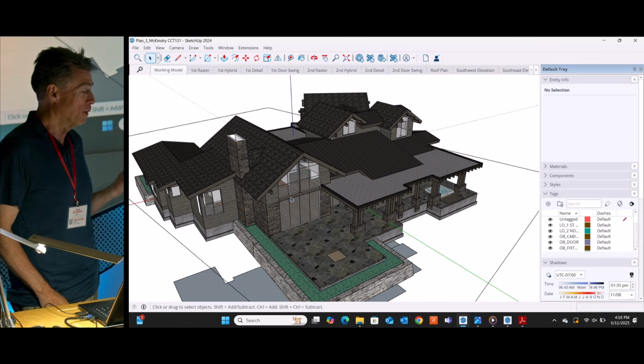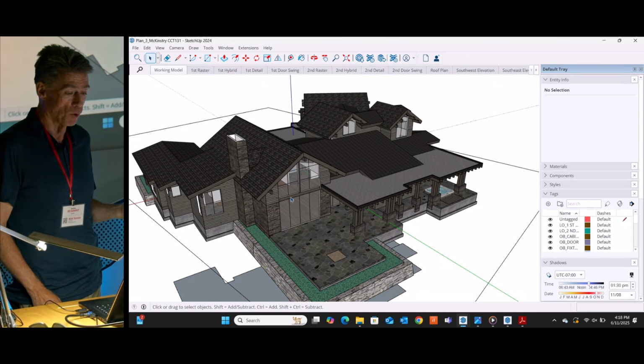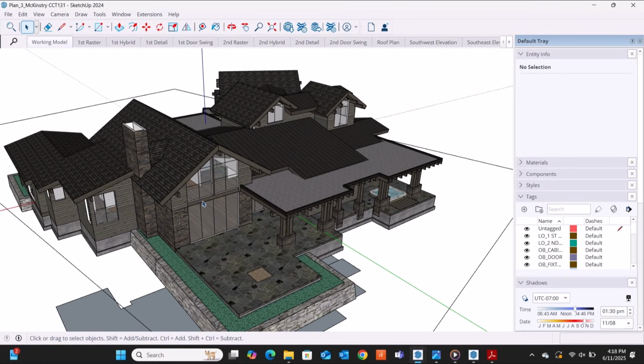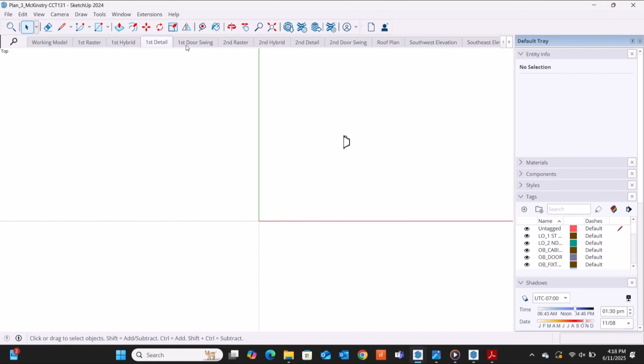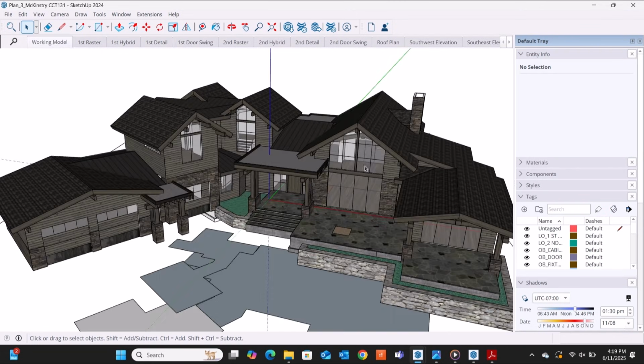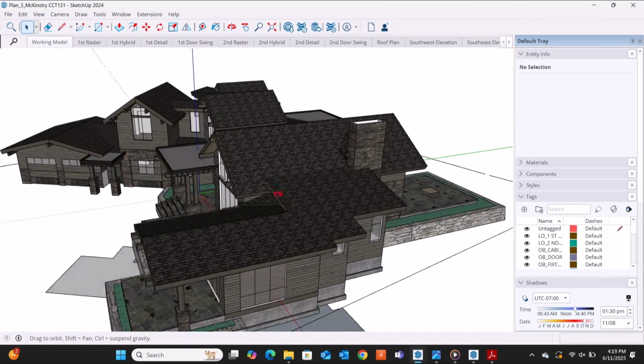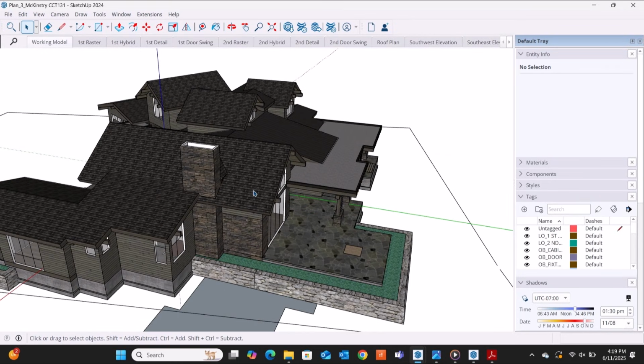We have to go through a pre-design meeting with them on site. Then we do a conceptual review, a preliminary review, and a final review. And so this is prepping for the preliminary review. And again, it's still in that exact same template, so everything follows. Again, there's still nothing detailed yet, so all the windows and doors are just openings with a plane of glass. This is, of course, to keep it simple during design. That way we can go through changes very fast.